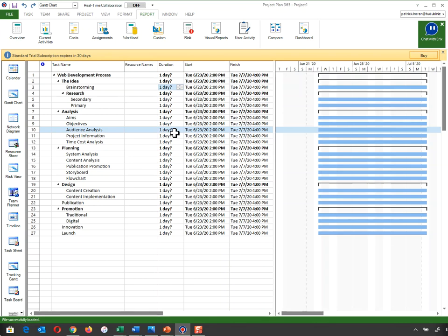On top of that, I would avoid using 1 day, because if I ask the class how many hours are in a day, people would normally say 24 hours. But really, when you're talking about working days, it's 8 hours. And we know from looking at our own timetabling earlier on that we're only working 2 hours on an actual Tuesday and 1 hour on a Thursday. So if I put down 1 day, it will actually take the equivalent of nearly 3 weeks worth of work to do that. So be very careful with your 1 days, especially your 1 weeks and your 1 months and your 1 years. Be very, very careful with that.